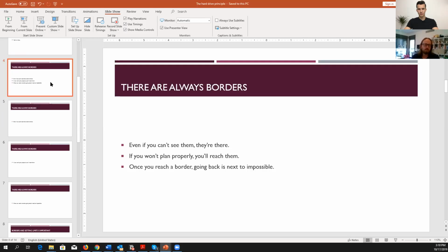You know, people might ask you how much a branding website or an e-commerce website would cost, and they want an X number. No, you need to take them and say what this e-commerce website needs to include. Does it need to include A, B, C, D? Do we have inside A, A point B, A point, etc.? The more you break it down to the bare minimum tasks, the better. I'll get more into it later on.